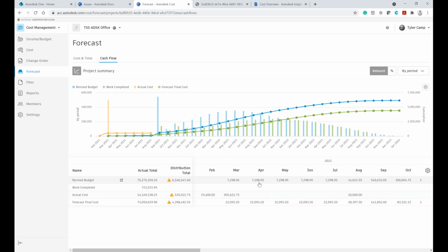What's going on? And then you as a project manager can say, well, did I procure items? So you can start looking at procurement and say, all right, I didn't order all my light fixtures. That's why my number's down. Well, I better get that taken care of or else I'm going to have to pay expedited fees. Or all my procurement's done. Why is my number low? Oh, I'm looking at it. It looks like we had 3 rain delays, so my labor's low. Or you can find out that maybe everything's on track, but maybe your pay app is missing information.